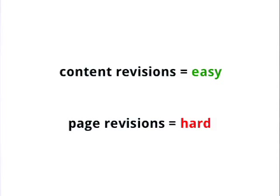Best case scenario, the client says, 'Oh yeah, that's fine, it doesn't really matter to me.' And if they say no, ask why. What's your use case? Is it because you're afraid people are going to publish things they shouldn't and you want to undo it? Well, let's try a really strict workflow system. Is it because you want to keep an archive of what your site looks like on a given day? We've actually built an HTML crawler for that — it's more lightweight, stored on a separate server. Building page revisions is a really major commitment, requires a lot of planning, and affects a lot of the rest of your site architecture. So it's really important to be clear about whether they really need that, and if so why, and can you find a better alternative.